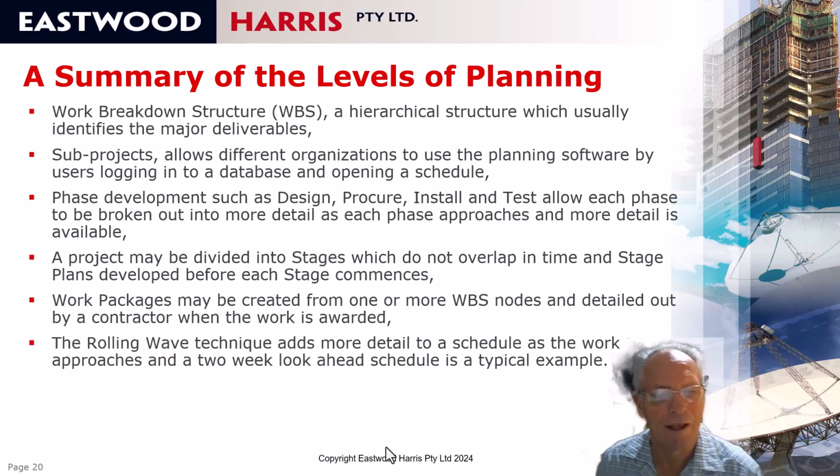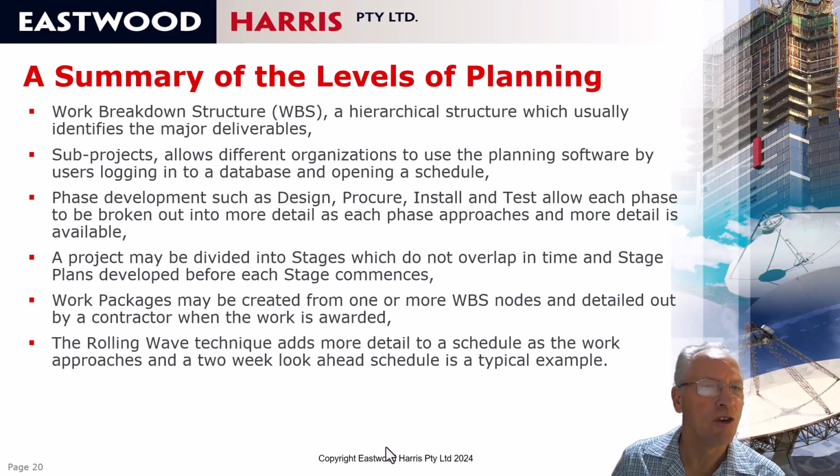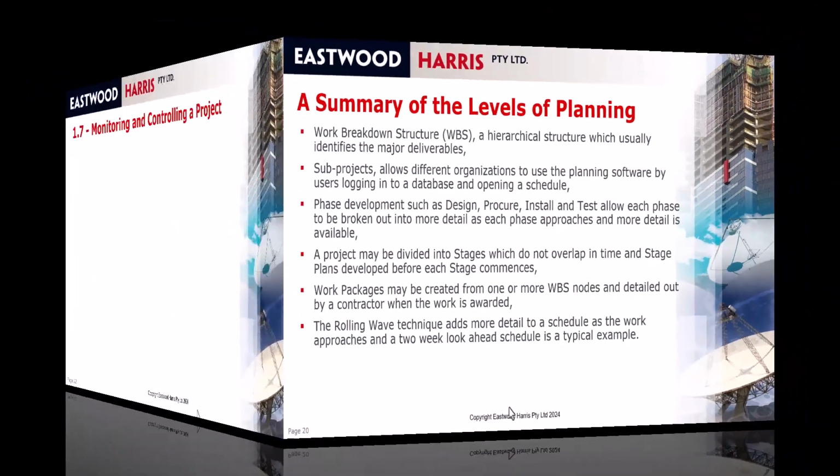The rolling wave technique is generally considered like a 2-week look ahead. So a week before you start the next 2 weeks' work, you would granulate the master program down into more detail. These are some of the techniques you might want to consider using to add more detail to your program.